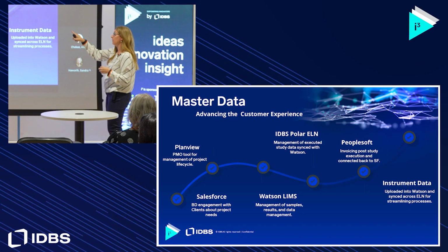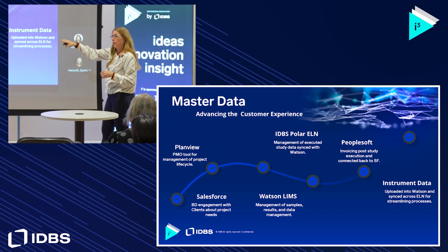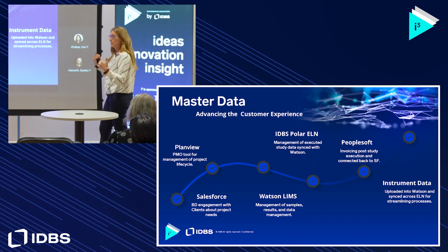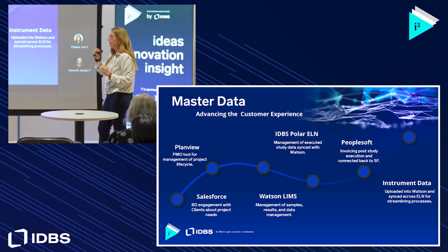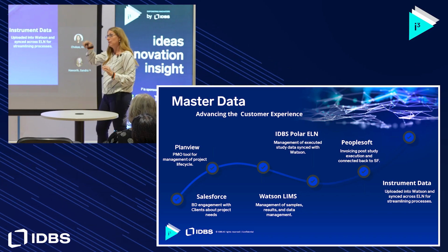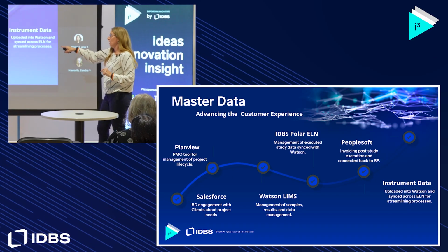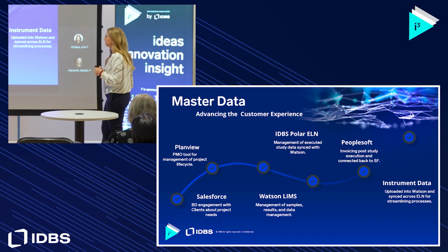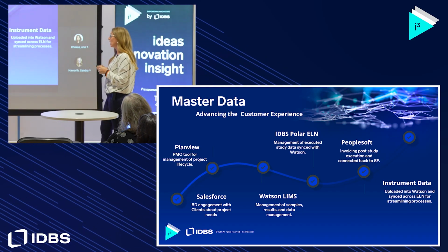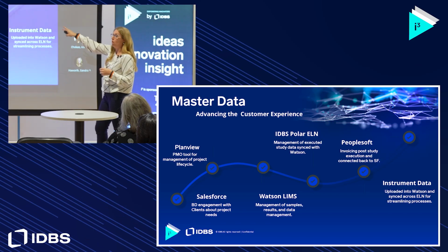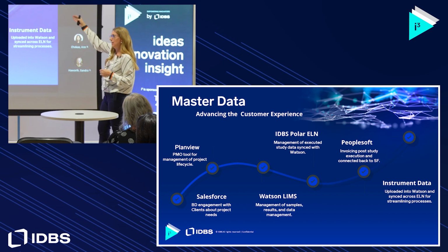Now the integration between PlanView and Watson, we're actually working on that right now. Once a project manager knows a study is coming to them, it's assigned to them in PlanView, they can add a little more data about the study, and then they flip a toggle that says integrate with LIMS, yes. Once they check that on, a study is automatically created in Watson. Then they can create the study design, copy master assay, and do a little more study setup in Watson. But once it's created in Watson, it automatically gets created in IDBS Polar. And that's where that piece ends, the ELN.